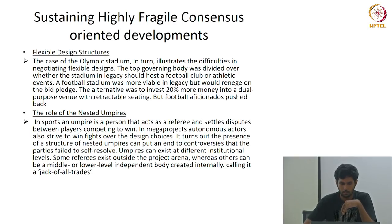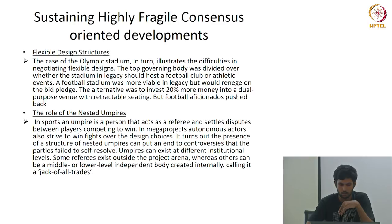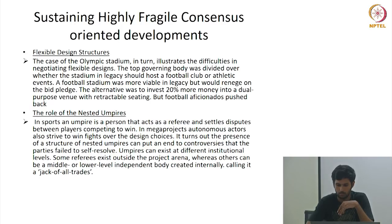The role of nested umpires: in sports, an umpire is a person who acts as a referee and settles disputes between competing players. In mega projects, autonomous actors also strive to win fights over design choices. The presence of a structure of nested umpires can put an end to controversies that parties failed to self-resolve. Umpires can exist at different institutional levels — some exist outside the project arena, whereas others can be middle or lower-level independent bodies created internally.